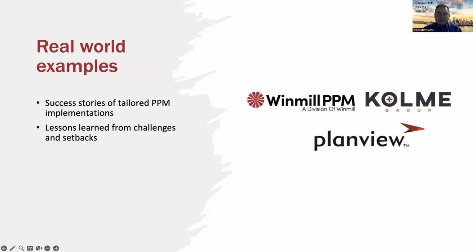While we were doing that, we formed, we called it a project management center of excellence. We brought all of those 15 PMOs together. We let them watch and even participate to some extent in terms of focus groups and participation requirements. But as we built out that first PPM solution, we made sure there was input from all of those 14 other PMOs, because they were stakeholders as well. And then we followed iteratively for each of those groups. So what turned out to be a terrific success started as what could have been an abject failure.